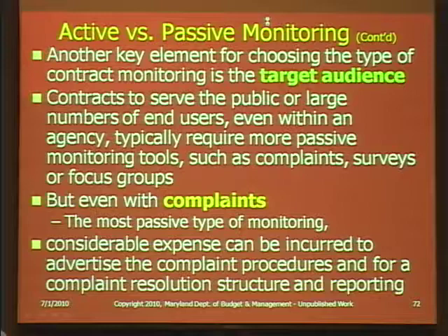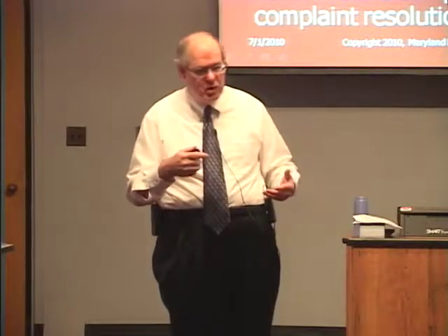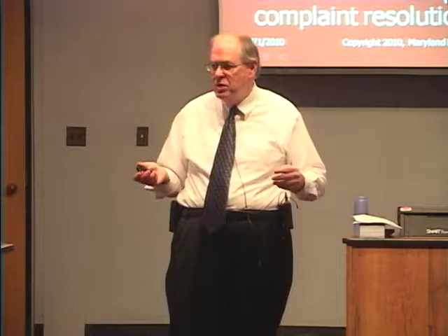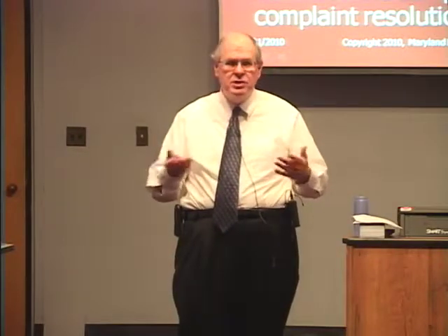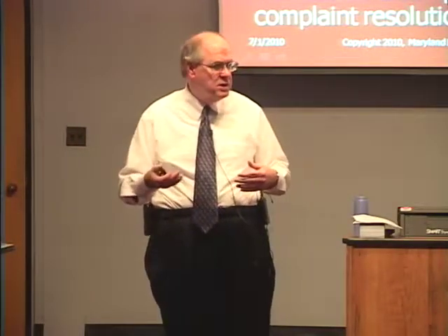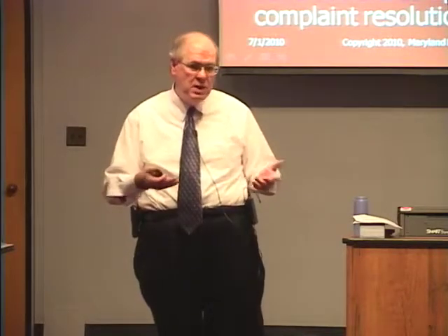Another key element, and this is what I just started talking about, to choosing the type of contract monitoring is the target audience. Contracts to serve the public or a large number of end users, even within an agency. If you have an IT contract, and the IT contractor is supposed to provide computer support for 8,000 people in the Department of Health and Mental Hygiene, what do you get, 8,000 reports? Does every person in DHMH report on a monthly basis their satisfaction with the vendor? The answer is no.